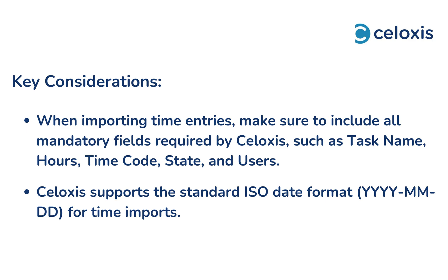Key considerations when importing time via csv. When importing time entries, make sure to include all mandatory fields required by Celoxis, such as task name, hours, time code, state, and users. Celoxis supports the standard ISO date format as shown for time imports.